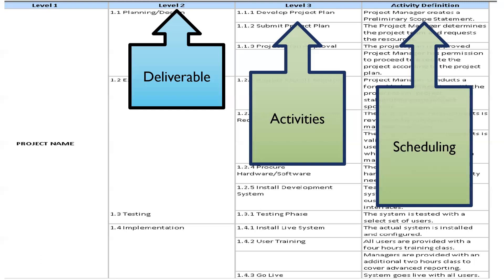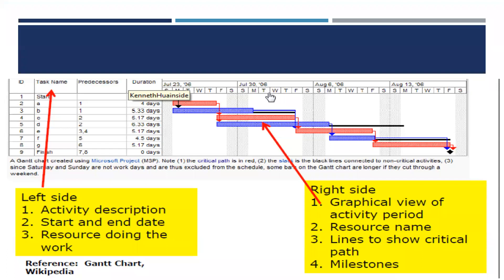Here is an example of a Gantt chart. You have the task name, predecessors — meaning the activity done before the next one — activity description, start and end date, resource, and work. On the right side is the graphical view. The time scale can be in days or weeks depending on the project. The graphical view shows the activity period, resource names, lines to show critical path, and milestones.